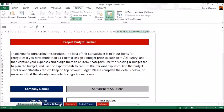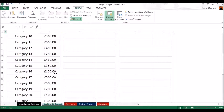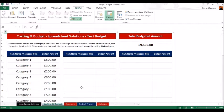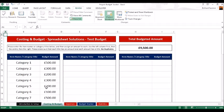On the first page you determine your costing. There are 111 spaces, so if you've got fewer than 111 products you can give each product its own entry. If you've got more than 111 products, you can assign categories — for example, if a project requires labor, you can put 'labor' as a category and add as many entries against it as you wish with a total. I've put in some random figures here in the hundreds of pounds, giving a total budget of nine and a half thousand pounds.